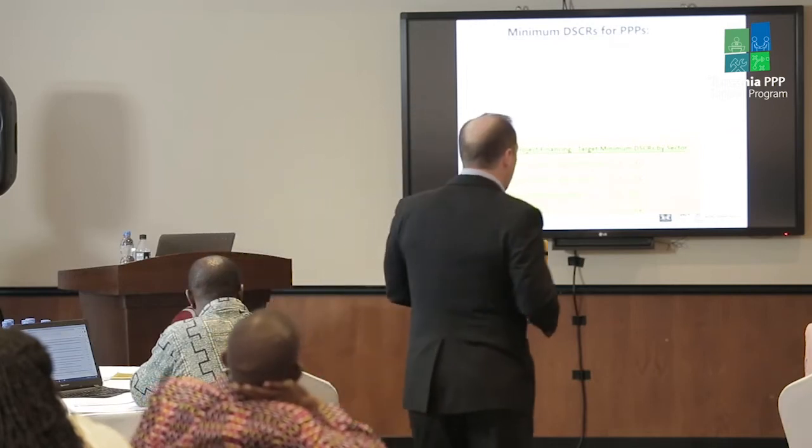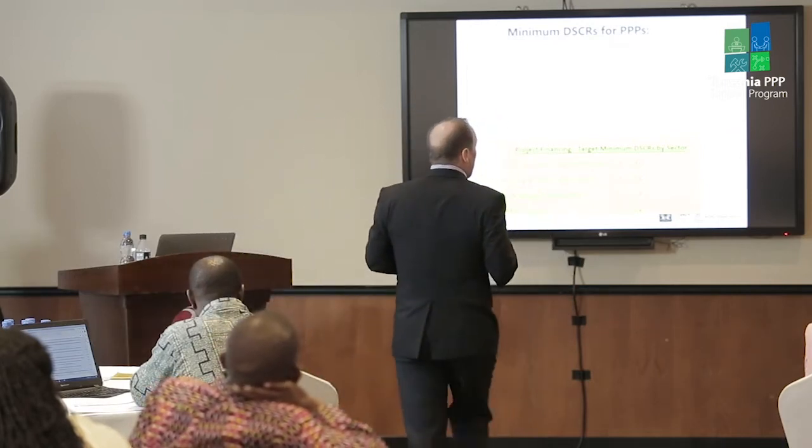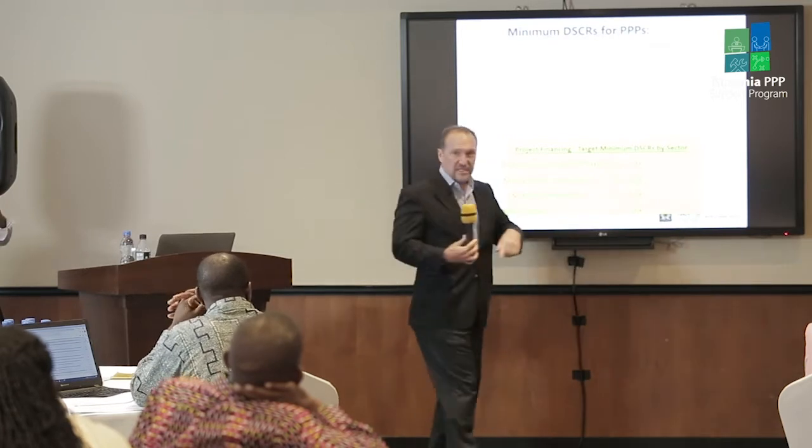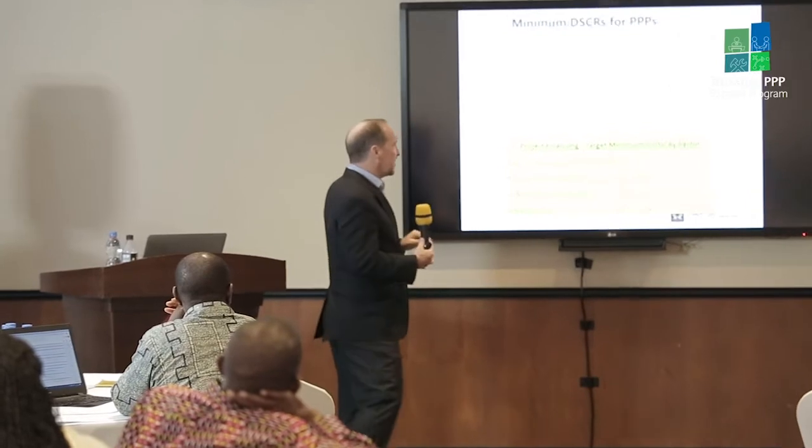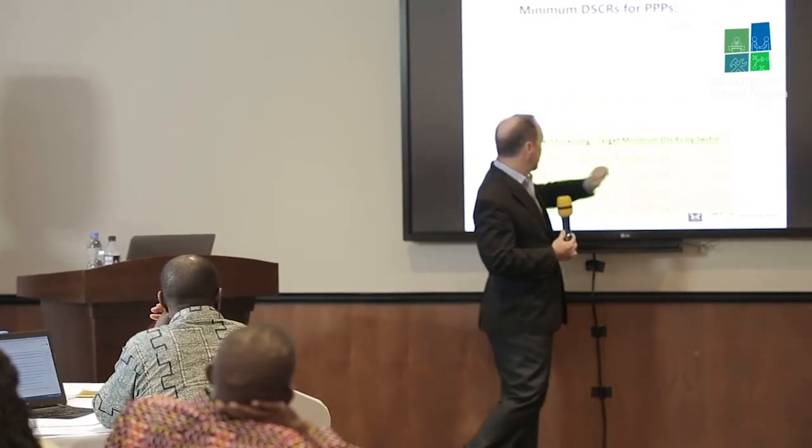But they don't face any market and demand risk. We say that they get paid a capacity payment for making the capacity available, meaning they're always available whenever, according to their contract, required. So really, it's lower risk. They don't take the uncertainties of only getting paid if they're generating power. That risk is taken care of. So it's a lower debt service coverage ratio.